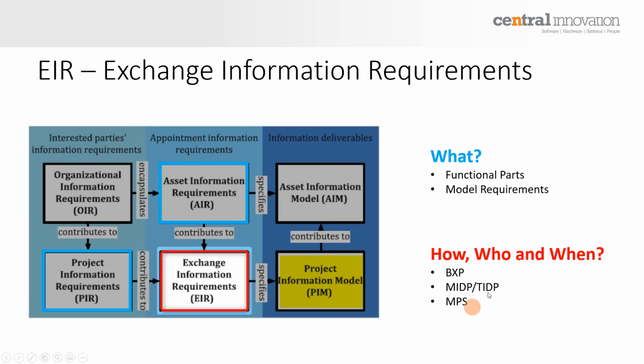So it is within that concept, within that stage and set of information, that you have things like BIM Execution Plans, Master Information Delivery Plans, Task Information Delivery Plans, which is sort of the same, only by discipline, and the old concept of model progression specification, which is that table that specifies model elements, level of detail or level of development, and model element authors. So that's more of an old type of document that actually serves the purpose of the exchange of information requirements.